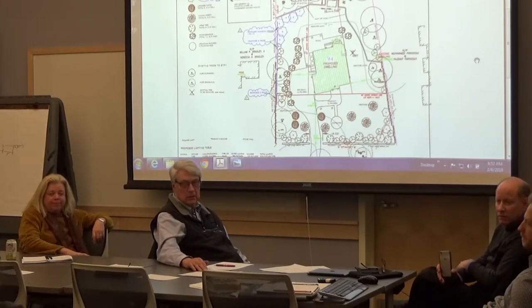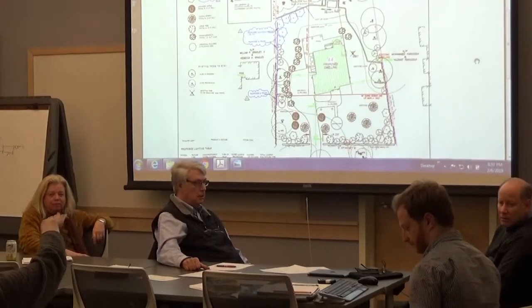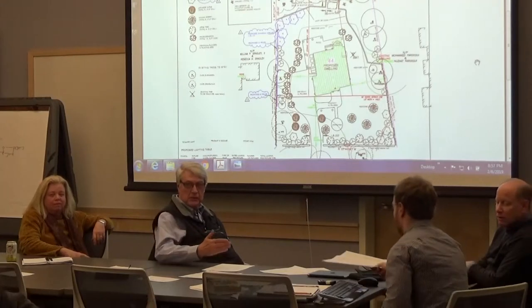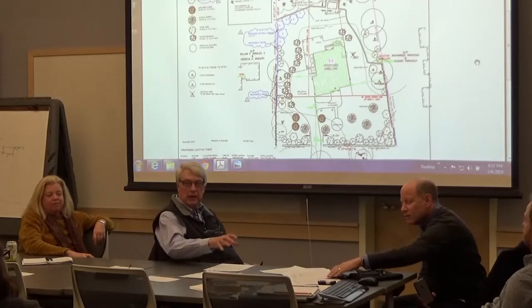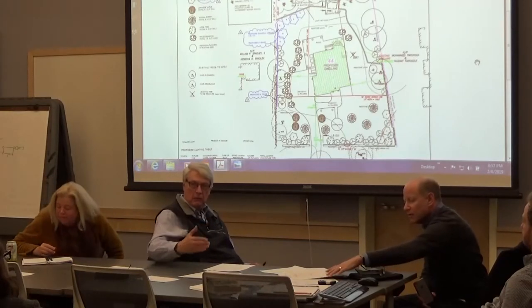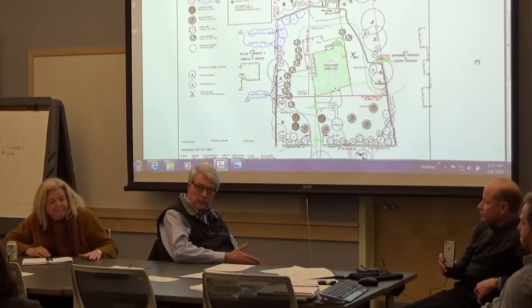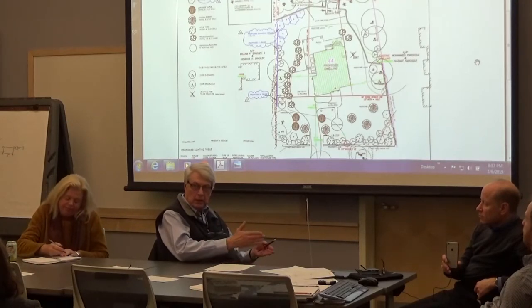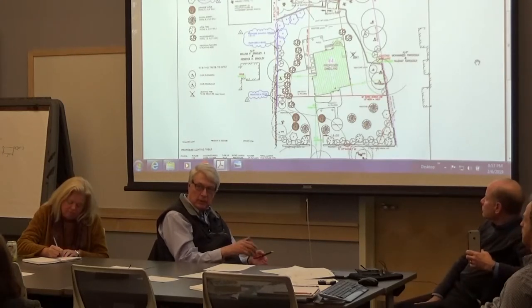So these are the two plans that can show exactly the difference. And the landscaping, that we had the estimate done, which I was told... Are you hearing us? We're saying this is what we need. I think these were submitted before, ahead of time. Yeah, but we don't need five drawings. We need a coordinated drawing that shows everything that's being proposed, including what's been built, and we need to compare it with what we signed off on before. We have to sign off on all of the items that are different from what we originally signed off on.